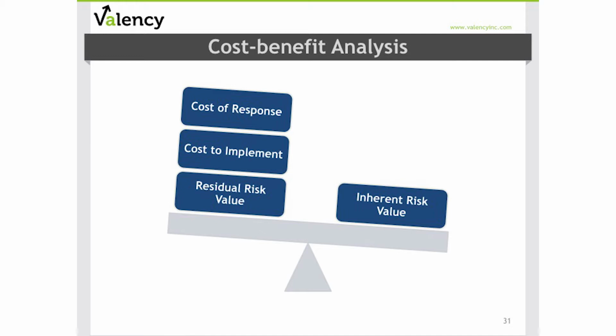In our case study, the project team went through a process of considering the cost and benefit of potential responses. This involves considering the inherent risk value. So what is the risk dollar value if we do nothing? We have a calculated risk value from our risk assessment that allows everyone to be a little bit more objective about the discussion around a specific risk.